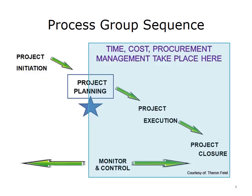Project planning can begin at the completion of two key project initiation processes. These processes involve creating the project charter and having it approved by the project sponsor, and identifying the project stakeholders. Once these steps are completed, the project can move forward. Initiating processes are performed to define a new project or new phase of an existing project. Planning processes are performed to define the scope and objectives of the project and develop plans to accomplish the objectives. During project planning, the project management plan and project documents are developed that are used to perform the project.